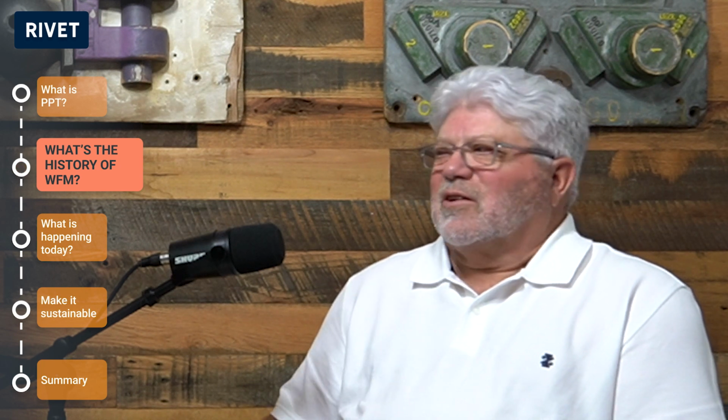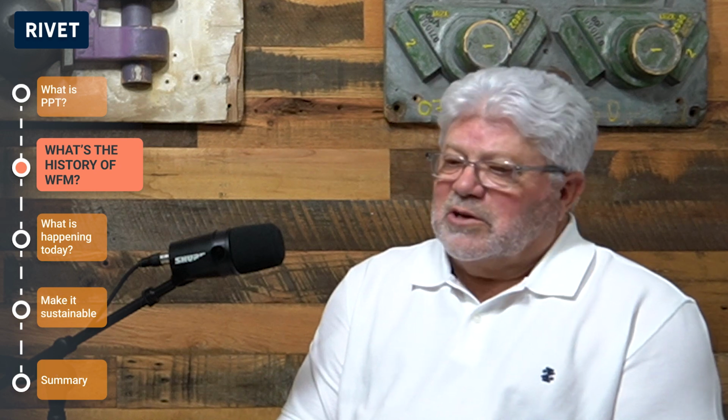They weren't allowed to cross over into each other's areas of expertise, so to speak. I believe we were making a mistake by not allowing the project managers to participate at a higher level in the labor management processes. We'd have jobs that would run over the labor budget, but the material budget was pretty much in line, and they were having difficulty trying to determine why these labor budgets seemed to be routinely running over. We had good estimators. We felt as though we had good estimates.